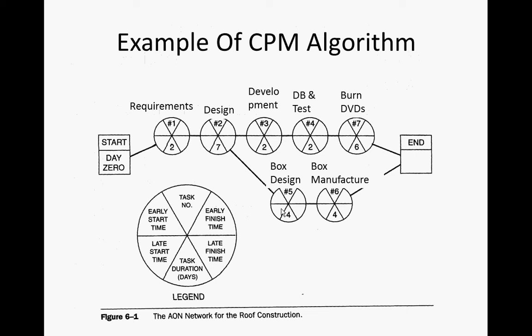Okay, so let's run this algorithm going forward from here. We're going to assign this an early start time, the very first node, which we could always create if there's more than one. We're going to assign early start time 0. Okay, so help me fill in the early finishes for this. So what's the earliest this node could finish? Yes. Okay. So the earliest it could finish, given everything that has to be done before it, which in this case is just that activity, is time 2.